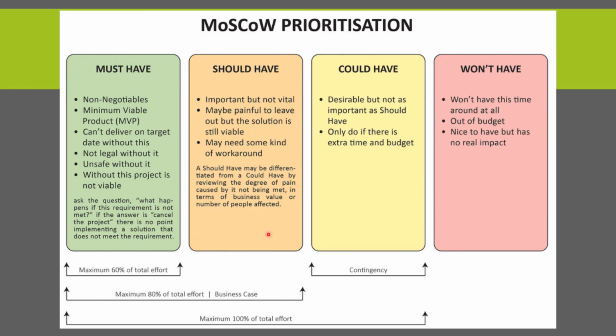As an agile coach, my coaching style is always to go for another 20%, load the team with 120%. The additional 20% can be part of a stretch goal, right? The team will have a commitment of a minimum of 60% up to 120%. If the team is at an initial stage, there is a possibility of estimation errors or relative sizing may go wrong, right?